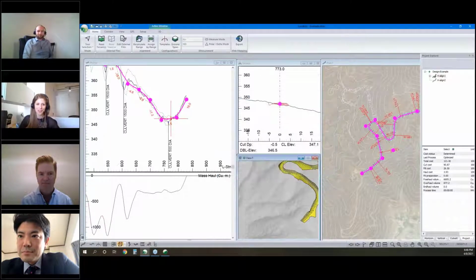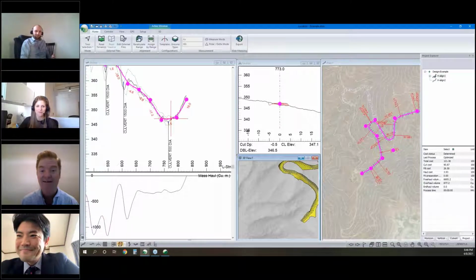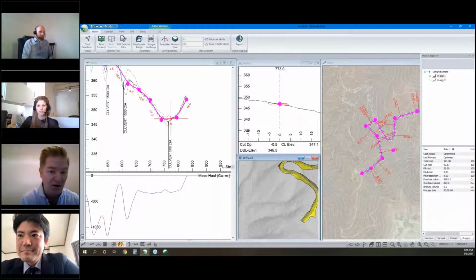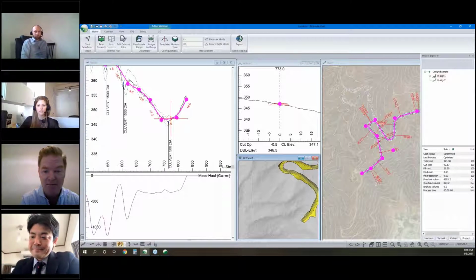Awesome. Okay, moving along. Darryl, after COVID's done, do you still plan to work with the satellite DEM data from AW3D? Yes, we're actually going to continue in this manner. It's still great to have people in the field who can get on the ground, but we can do a lot more before that happens now by taking the data from AW3D and doing some preliminary planning. In this case, we've been able to take it from planning all the way to a permitting application without having to do too much on the ground whatsoever. So it's been a great product that way.